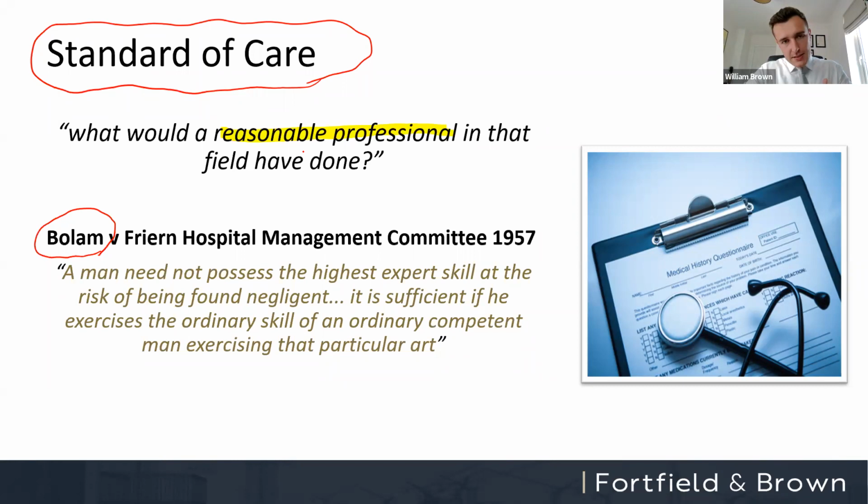Quite a lot of these cases look at the medical side of things. They look at doctors. By the same token, if you have a junior doctor, or in the case of construction, a junior QS carrying out an activity, the standard is not what the junior QS would have done. The standard is not what the junior doctor would have done. It is what would the reasonable doctor have done. That hypothetical doctor at the back of the room, having an understanding of all of the facts, what would they have done in the scenario?